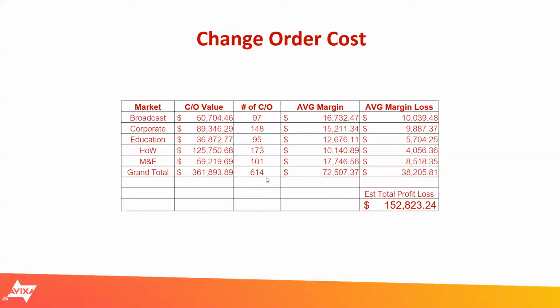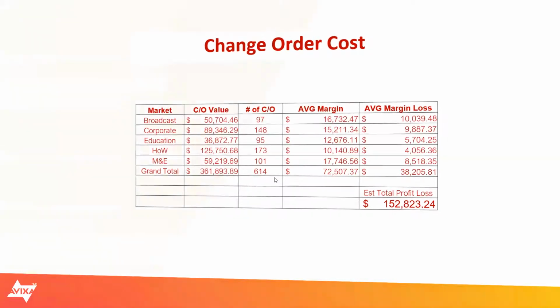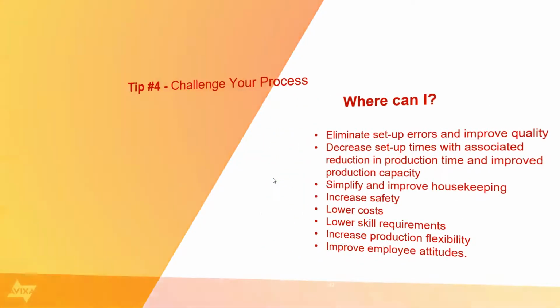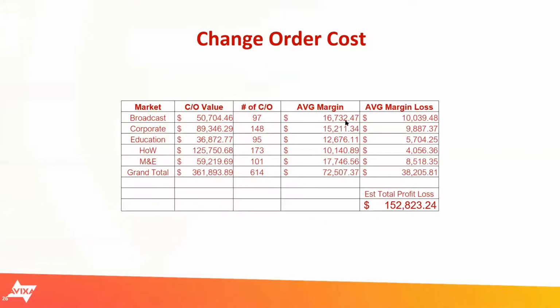Because what happens is ultimately people were selling the projects, and I didn't quite illustrate that here other than the average margin and the margin loss, that they would end up selling the change orders at a much lower margin than the original project was sold.